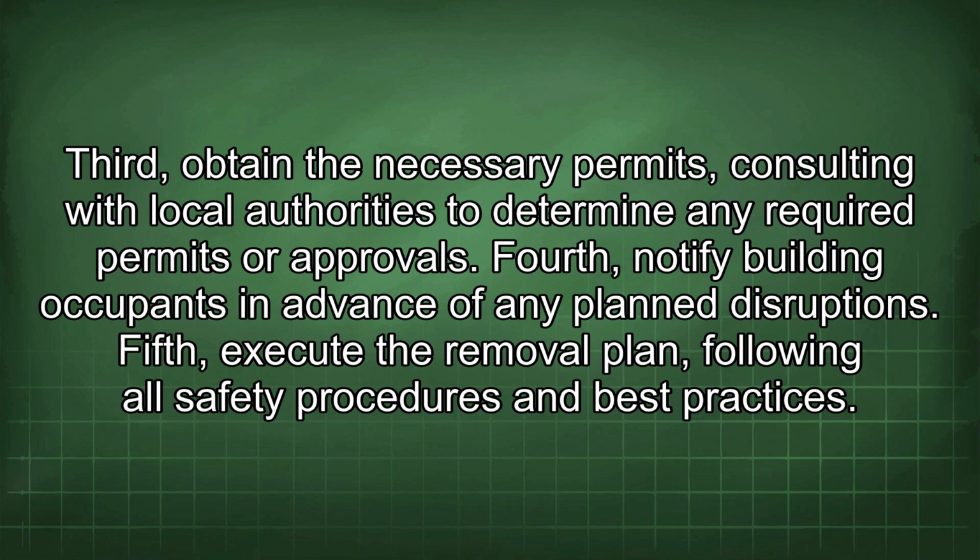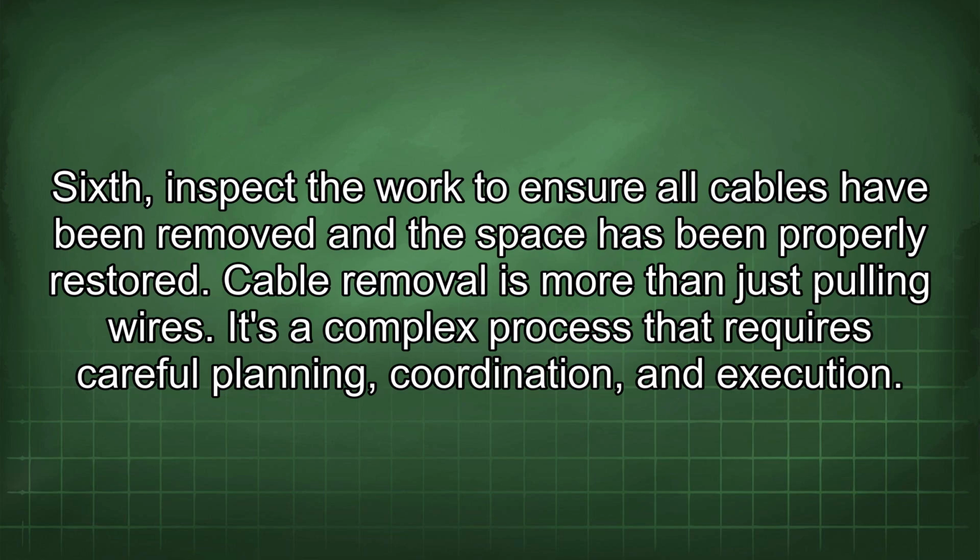Fourth, notify building occupants in advance of any planned disruptions. Fifth, execute the removal plan, following all safety procedures and best practices. Sixth, inspect the work to ensure all cables have been removed and the space has been properly restored.